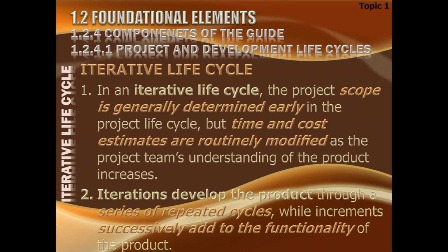But in agile, the things are quite different, because here the iteration is not very long. Not all iterations are of different size. Here we have decided beforehand the iteration size, and it is going to be consistent for every iteration. And here we are not targeting the product in that iteration. We are targeting only the time. There is a time capsule we have created, and whatever job we can get accomplished in this time capsule would be delivered. So iterative can have many shapes and forms.